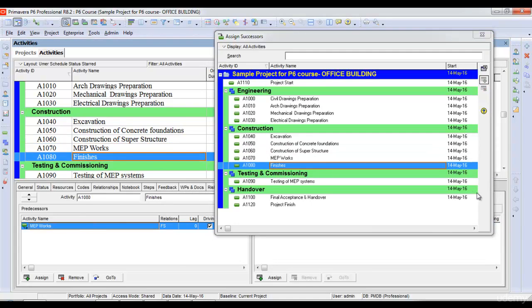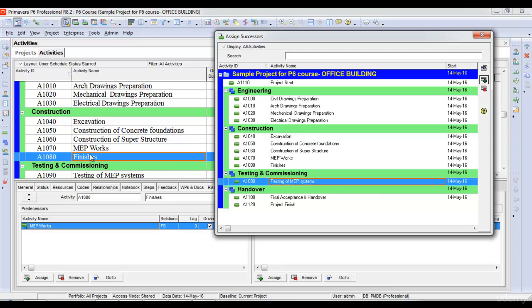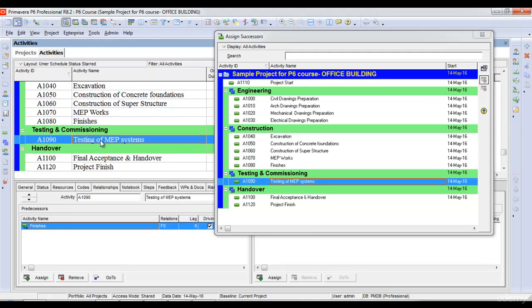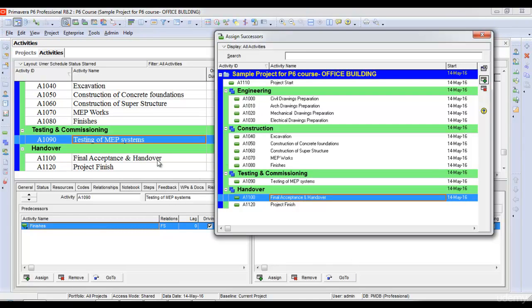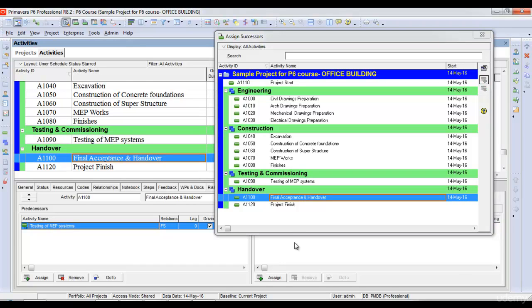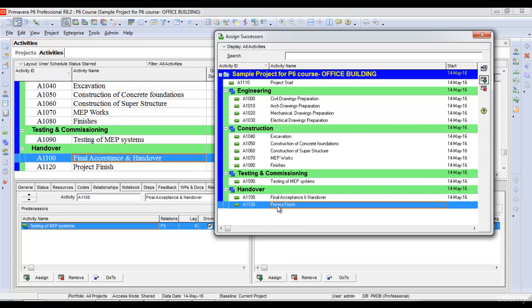After finishes, we'll start testing and commissioning. After testing, we'll start final acceptance. Finally, after final acceptance, the project finish.